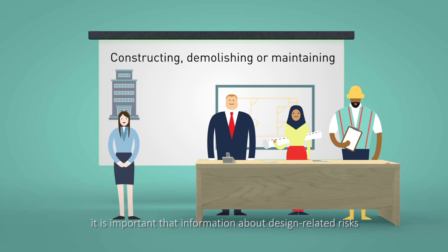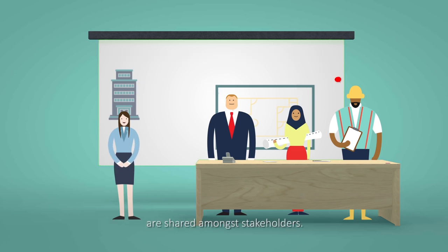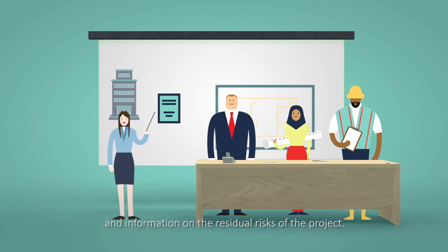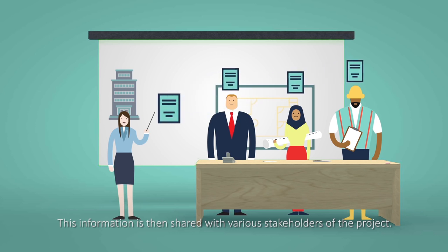During the project, it is important that information about design-related risks are shared among stakeholders. This is done via the DFS register, which is prepared by the DFS professional. This register should contain discussion notes for the DFS review meetings and information on the residual risks of the project. This information is then shared with various stakeholders of the project.